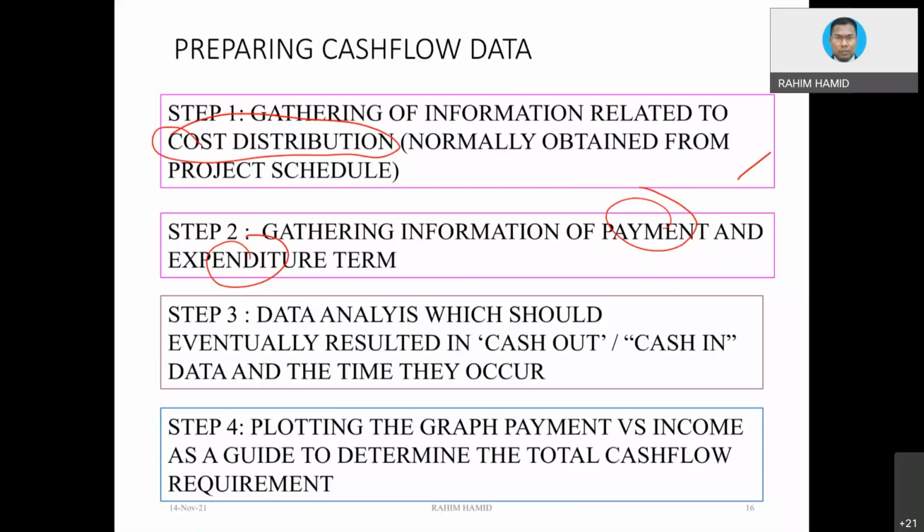And the term normally being put there, maybe you have already reached 10% or 15%, is in order to give encouragement for the contractor to really start the work. To get the first payment, you really have to show that you are doing the work. Then subsequently, the payment would be much more regular. Okay, that would be one thing. And then the second thing is how regular is the payment? Normally, we would assume that, as a normal practice, you will submit the monthly payment claim.